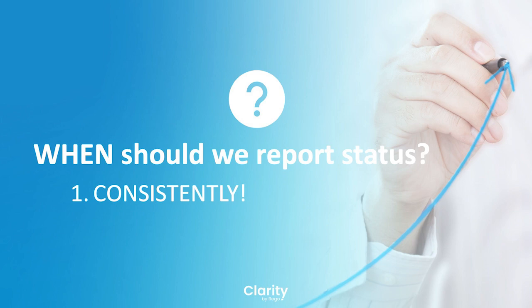Conversely, we might have some very small projects that are running and following a very lightweight governance model. We had a large number of these when I was running my PMO. They were still considered projects, but they were often managed by a functional lead or subject matter expert rather than a dedicated project manager, and they didn't require the usual level of rigor and governance. In cases like this, you might do status reports less frequently. You might not even require them at all for these types of projects, but merely ask them to consistently update their progress on milestone tasks or percent complete. So this is going to really be determined by your organizational standards and business rules.